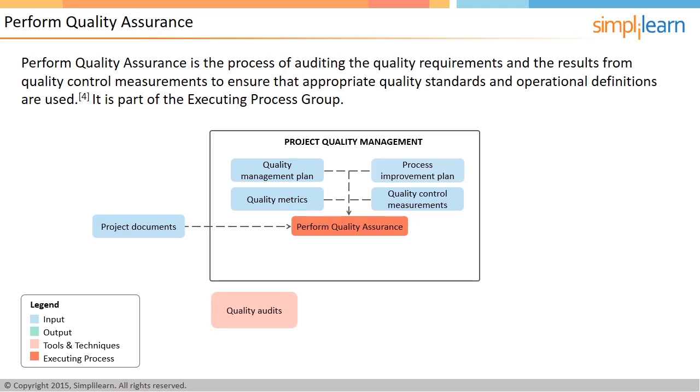Quality audit is the process to check whether the project is complying with the organization policies, standards, and procedures, and determine whether these policies, standards, and procedures used are efficient and effective. So a good audit not only looks at this compliance, but also for the new lessons learned from the current project that can help make the future projects better.